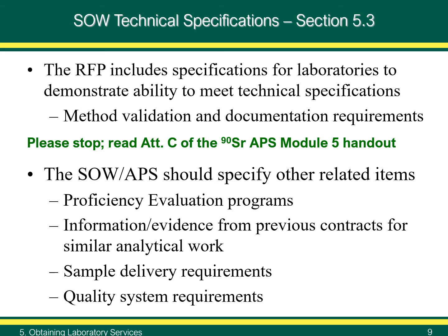Slide 9, SOW Technical Specifications Continued. MARLAP Section 5.3. Because radiochemistry laboratories must validate methods, radiochemistry SOWs and APS must clearly define what laboratories need to do to demonstrate that they are capable of meeting the technical specifications in the RFP. These include method validation and documentation requirements.